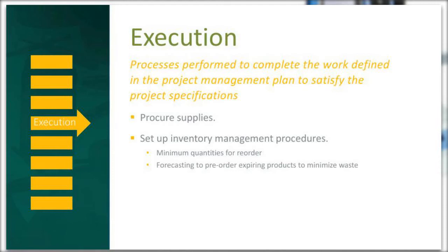Are you going to get it from multiple different vendors and manufacturers and have multiple shipments all coming to one place? Are you going to have them all drop shipped out? And what are your lead times going to be? Remember, things like special orders can take anywhere from 6 to 8 weeks, sometimes up to 14 weeks.